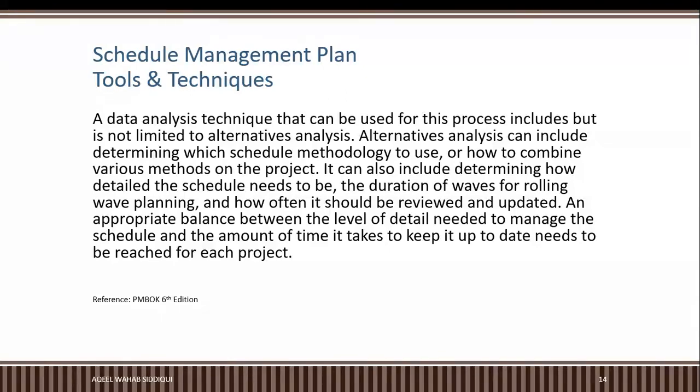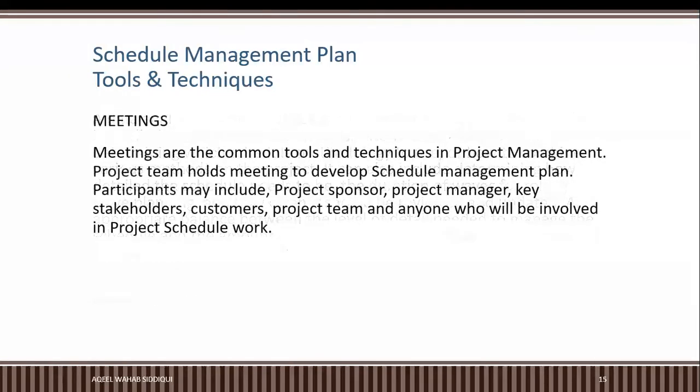It can also include determining how detailed the schedule needs to be, the duration of waves of rolling wave planning, and how often it should be reviewed and updated. An appropriate balance between the level of detail needed to manage the schedule and the amount of time it takes to keep it up to date needs to be reached for each project. Next tool and technique is meetings. Meetings are common tools and techniques in project management.